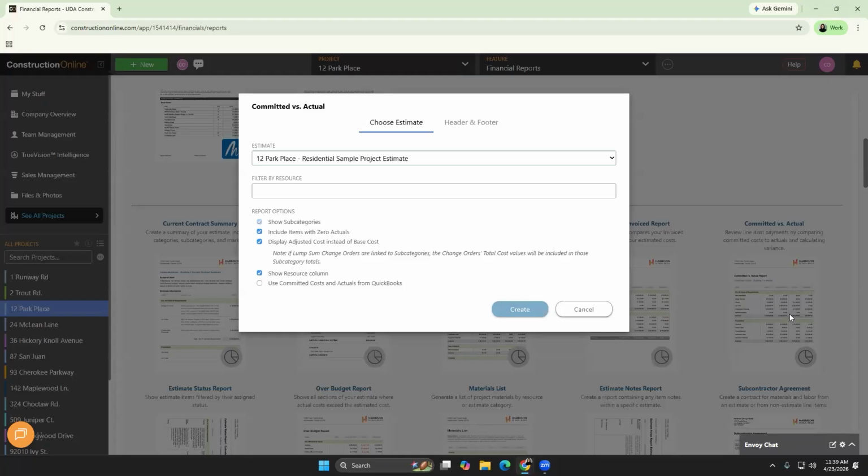It may bring up a question of, okay, why is that occurring and how can we hold our subcontractors more responsible? Or potentially, maybe I need to find a new subcontractor, even if I have a good relationship with this one, because we consistently go over budget of what they are telling us that we should be committing to spend. So you get a lot of really good insight into subcontractor performance.